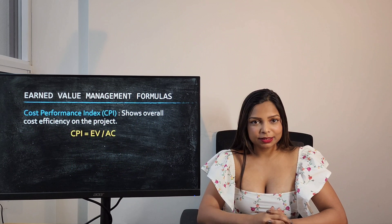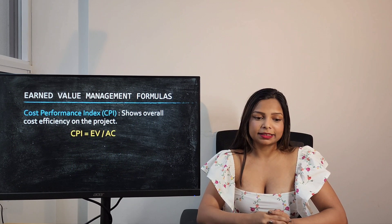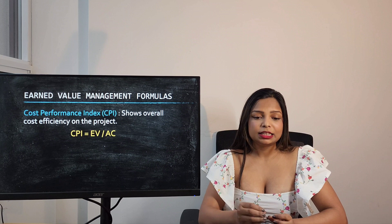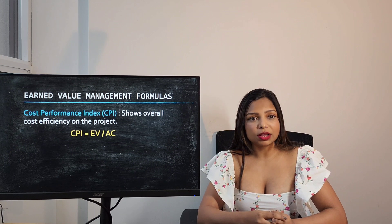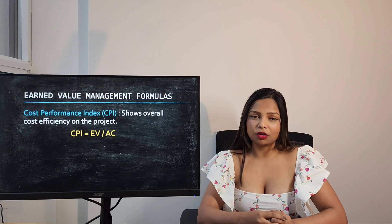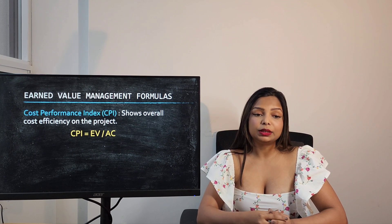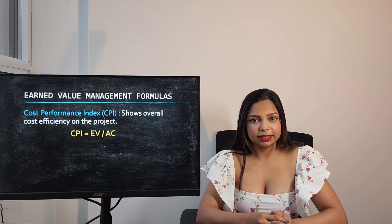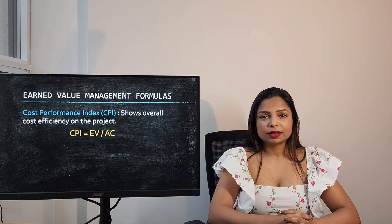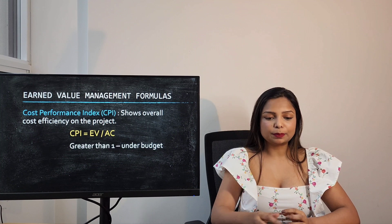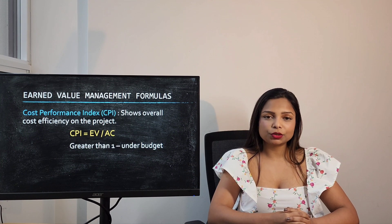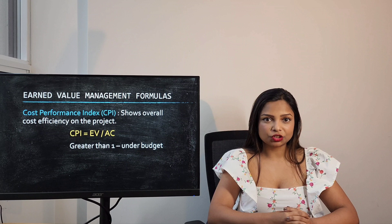Cost Performance Index, or CPI, shows the overall cost efficiency of the project. To calculate CPI the formula is EV divided by AC. If the CPI is greater than 1 it means your project is under budget.